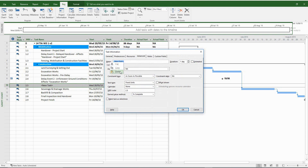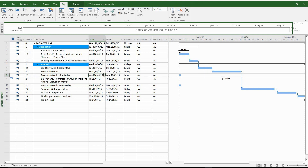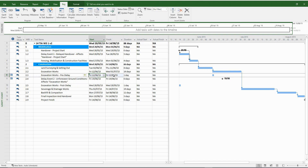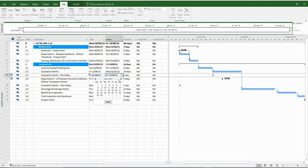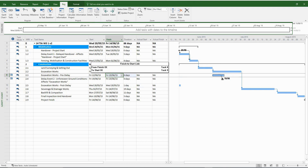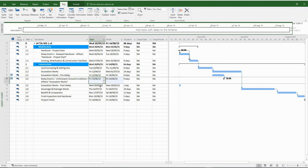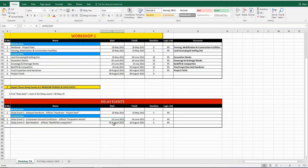This is the last activity for our Fragnet — let's call it ExcavationWorks post-delay. ExcavationWorks pre-delay is the first activity of our Fragnet, so it should have a start date equal to the original ExcavationWorks start date. The finish date would depend on the calendar you're using — it could be the date prior to the start of the delay event or the exact start date of the delay event. For this exercise, the finish date for ExcavationWorks pre-delay is the 19th of June 2015, and the start date for delay event two is the same date.